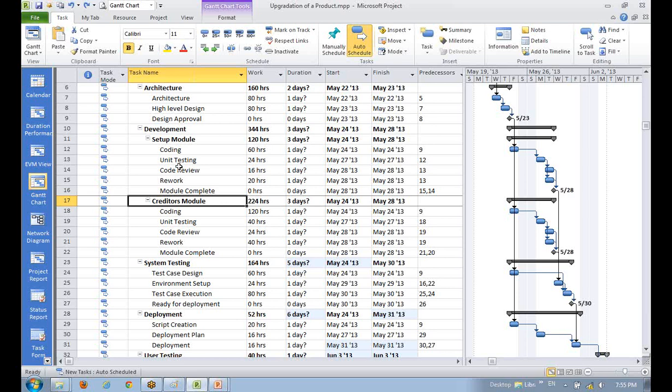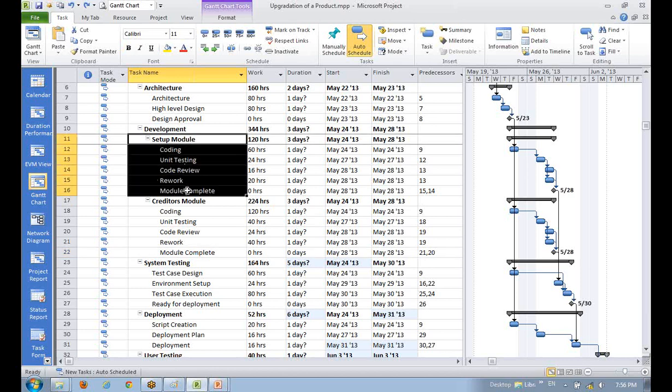I think that is the same question Sarupri was asking, what to do in such a case. So in such a case, correct, if you do not have any visibility, don't plan them all together. Because normally agile projects are T&M projects. Right, because you don't know the requirement, you cannot really go into a fixed bid project. So because it is T&M and you don't know the requirements, the target date of the overall project does not matter to you. Agree. What target date actually matters to you? The target date of this sprint.